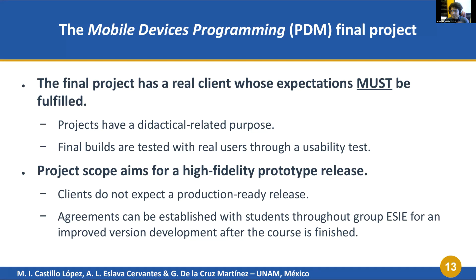Of the 16 weeks of the course, about eight are dedicated to project development, and four of these eight weeks are devoted to productive activities such as coding. For this strict time frame, an agreement is established with the client to scope the project as a proof-of-concept high-fidelity prototype. This allows the client to realize if the produced application really allows achieving its goals, where changes are necessary, and if different requirements should be addressed.